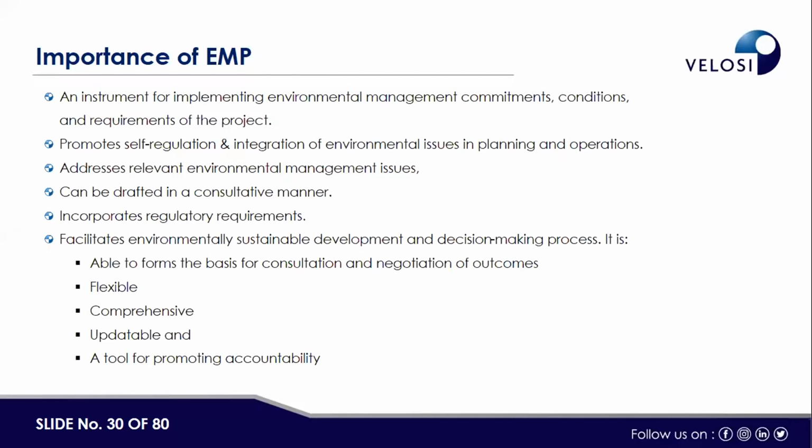Next question. This EMP is a part of a quality plan or a part of HSE plan? No, it's separate. It's neither the quality plan nor an HSE plan. It depends on the region and on the authority. Normally, if I talk about a construction project, the contractor has to develop the HSE plan. But to get the NOC from the regulatory authority, the EIA or these kinds of management plans are required. But HSE plan and the quality plans are different.